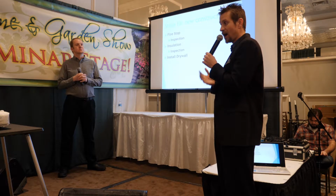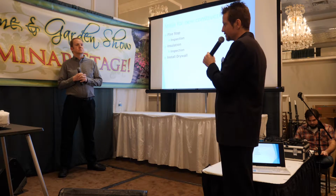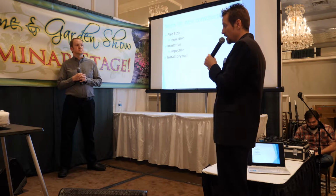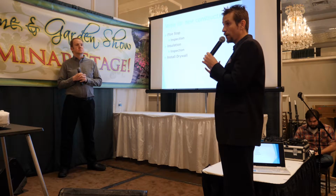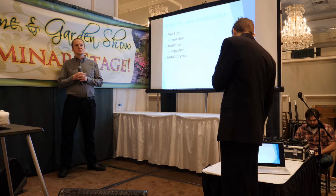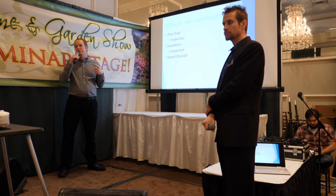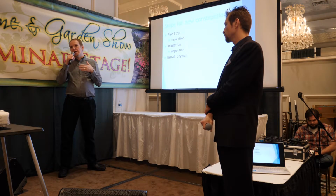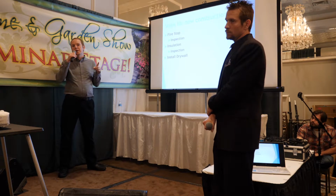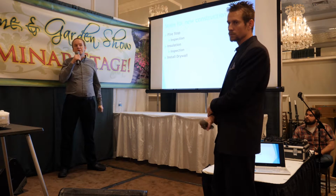Because I've seen it time and time again, where somebody owns a house that needs to be knocked down and it's still sitting there because they weren't working with an architect that understood the city and the permit process, and that will cost you not only financially, but the timelines will be way drawn out. If the city kicks back the plan and says, oh, we need to show this, we need to show that, each time you take it back to the architect, then they submit it, and then the city takes a week or 2 to review it. So with multiple kickbacks, you could be waiting 2 months extra just from those delays.